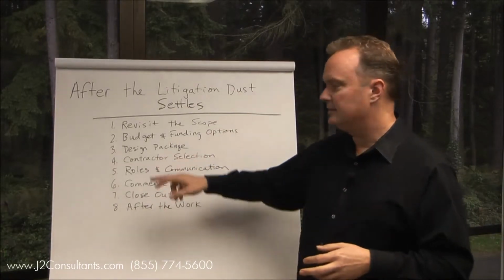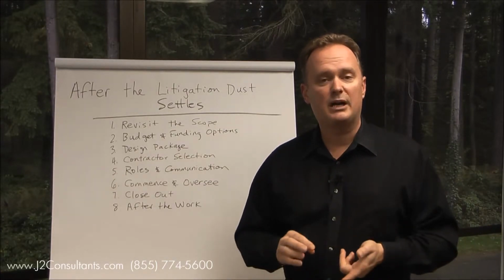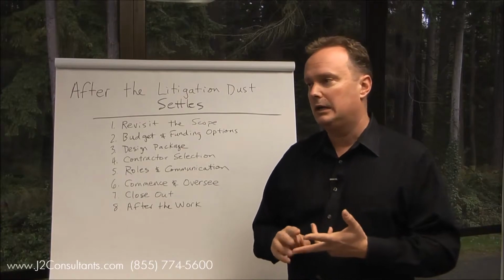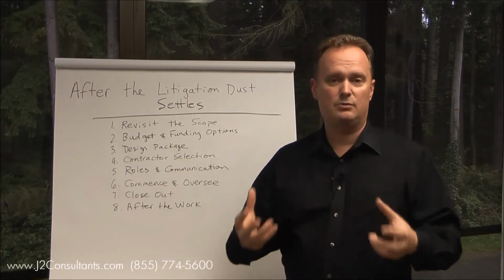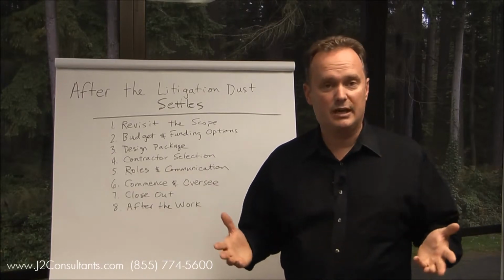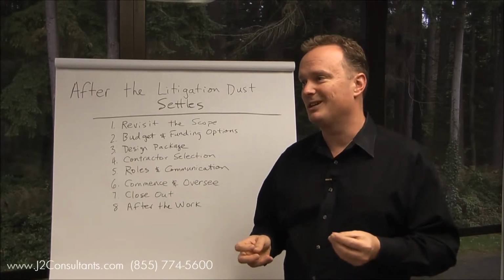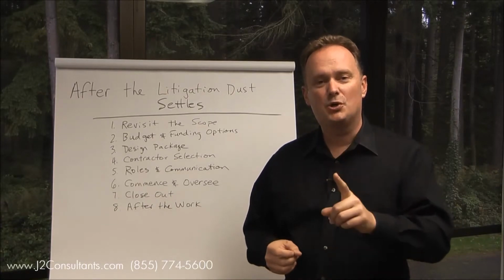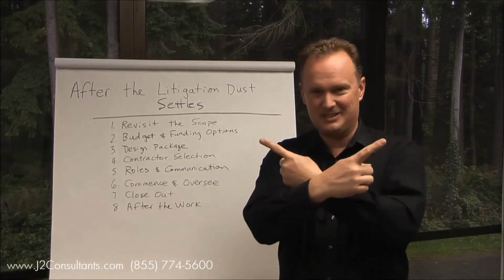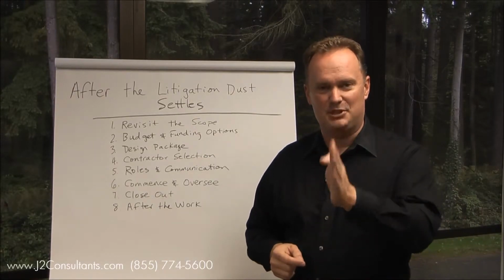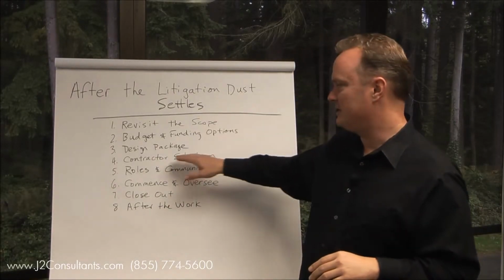So then you go on to the contractor selection. Oftentimes your bylaws require multiple bids on projects over a certain size. Another way to do it is to negotiate with a contractor that you trust. Another way to do it is a design build option. As one of our clients said, and I like the phrase, I want one throat to choke. I don't want the designer and the contractor pointing at each other. We want one stop shop. So there are several different ways you can pick a contractor.